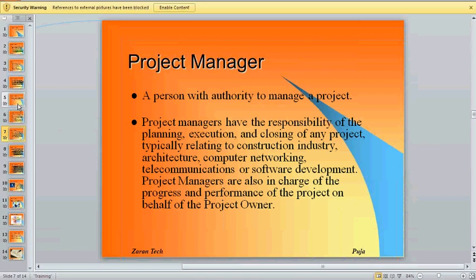Because time is money. Let's look at it this way. If I say we need 3 developers to build this code in 3 weeks or 4 weeks. If one developer works 40 hours per week, how many hours is that in 4 weeks? 160, right? One developer works 40 hours per week.